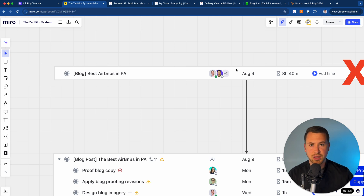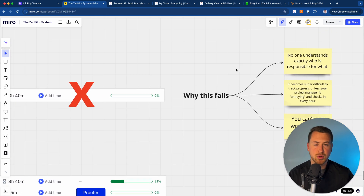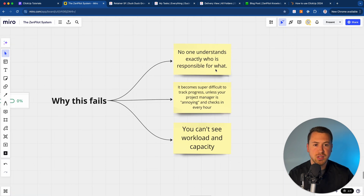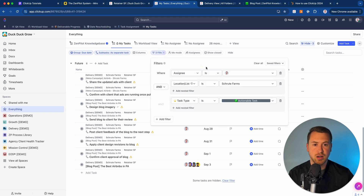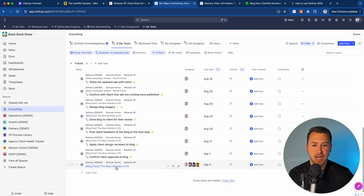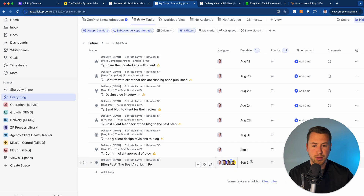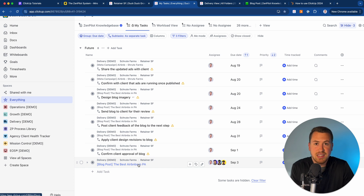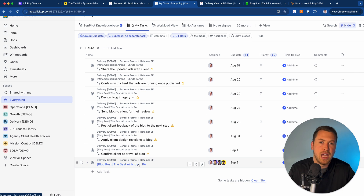The reason that this does not work is because with that task structure, essentially no one is going to understand who is responsible for which step. If I have a view of tasks that are just assigned to me, I'm going to see this blog post — "Best Airbnbs in Pennsylvania" — assigned to a bunch of different people, due on September 3rd, let's say. And I don't know what I'm supposed to do. Am I supposed to write it? Am I supposed to be proofing something? Am I supposed to be designing the thumbnail, or what task in this process am I actually in charge of?